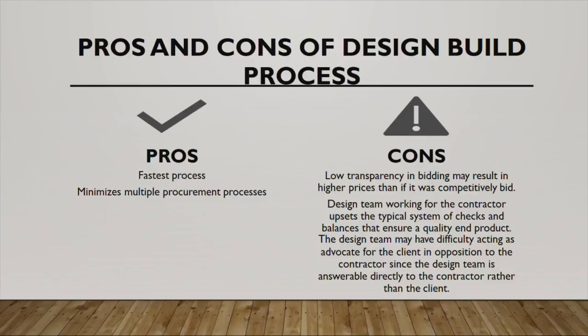Yeah, and if I could talk just a little bit, obviously the pro to that is you're able to maximize time on the multiple procurement processes that you're not going to have to go through. That's probably the biggest benefit, the timetable. The adverse on the other side of the coin, what makes it challenging, is that your professionals are working primarily for your contractor. They don't represent the school board, so they're working together hand in hand to come up with the design, the construction documents, all the way up to the final guaranteed maximum price on the project itself.